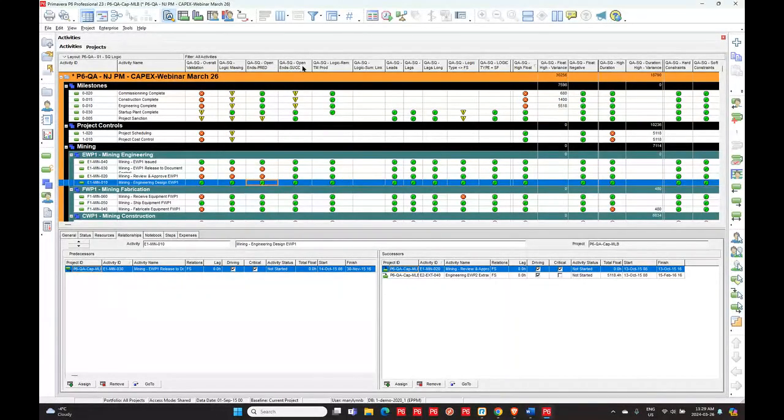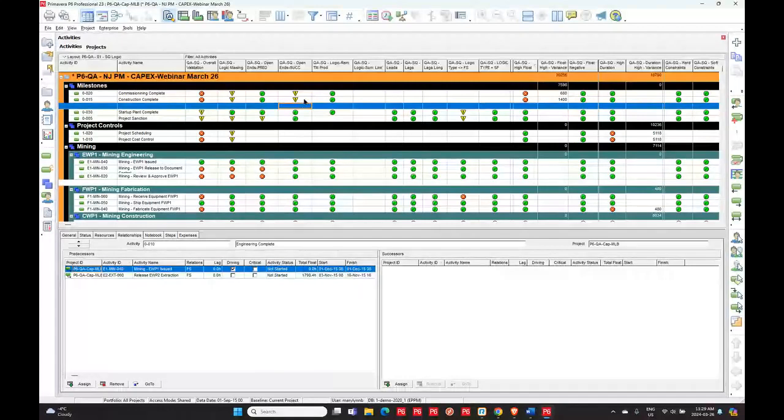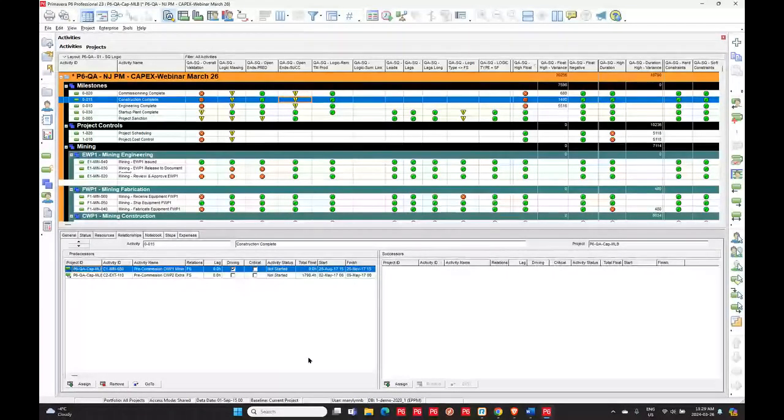I've got open-ended successors. I cleaned up the activities, but you're still going to see open-ended successors in that report simply because I've got some yellow icons. In a few minutes we'll have a look at how you set it up if you want a differentiation rather than just pass or fail as indicators. You can set up the percentages where a certain percentage is a complete fail. Between certain parameters, it is a warning. And below a certain parameter is the green, the pass. So you control that as well.